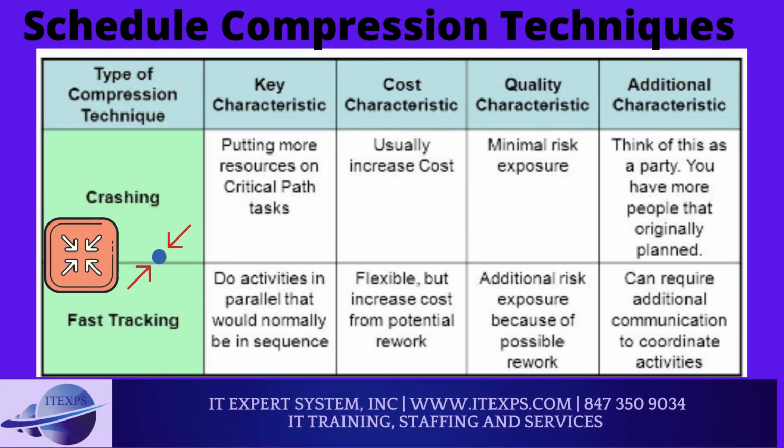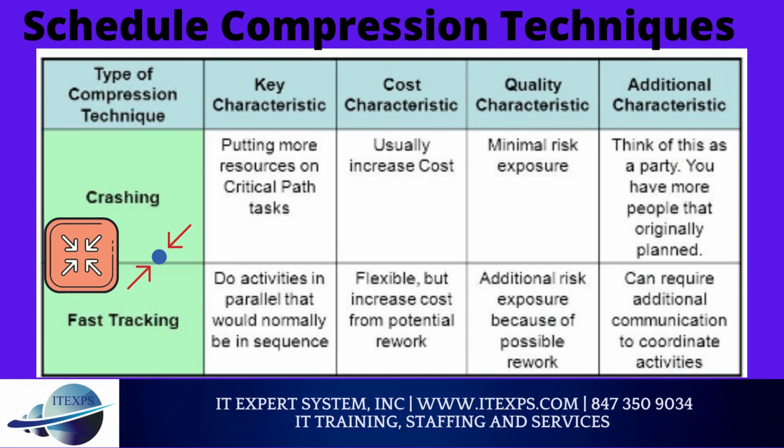Schedule compression techniques. 1, schedule crashing means adding more resources and finishing tasks early. This option increases the project cost. 2, fast tracking means performing many activities in parallel. This option increases the project risks.